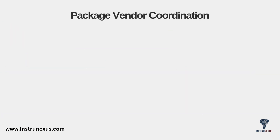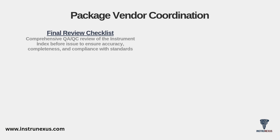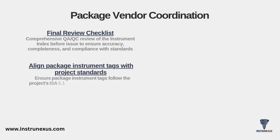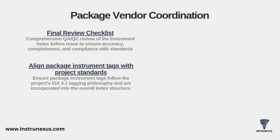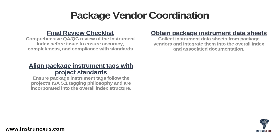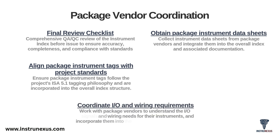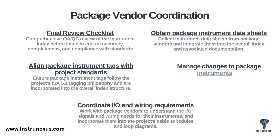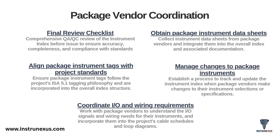Package vendor coordination is one of the most challenging parts of this job. You must coordinate with these vendors early — preferably during the FEED stage — to understand their instrument tagging and data requirements. Next, you must align their instrument tags with your project standards, often by incorporating them into your overall index structure with a prefix. You must obtain all package instrument data sheets and integrate them into your main documentation set. You also have to coordinate all their I/O and wiring requirements and get that information into your project's cable schedules and loop diagrams. Finally, you must have a process to manage changes when the vendor updates their specifications.